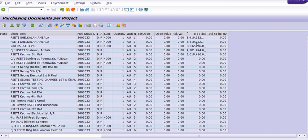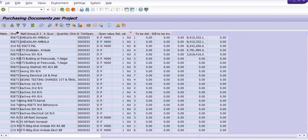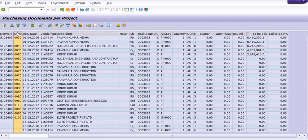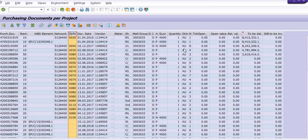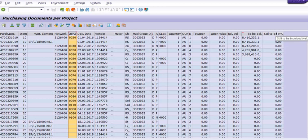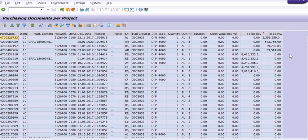You can check this data as per your records. This is the vendor code. Here I am selecting the column 'still to be invoiced.' These are the purchase orders for which goods receipt has been done but still not invoiced.